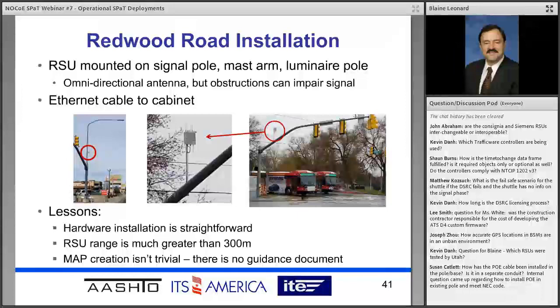So that's just a little bit about this system. You may well know that these roadside units need to be registered with the FCC. The agency has a license for DSRC around the state, and then we worked with a gentleman in one of our other state agencies who handles wireless communication, and he registered these on the FCC site. It's a fairly straightforward process.